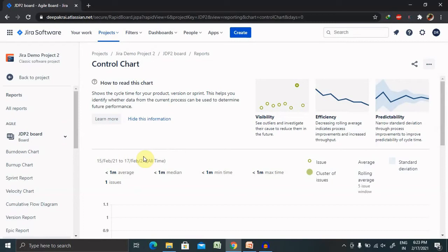Understanding what cycle time and lead time mean will help. Cycle time is the time spent working on any particular issue, typically the time taken from when work begins on an issue to when work is completed, but it also includes any other time spent working on that issue. For example, if an issue is reopened, worked on, or completed again, then the time of this extra work is added to the cycle time. How is the cycle time determined here?